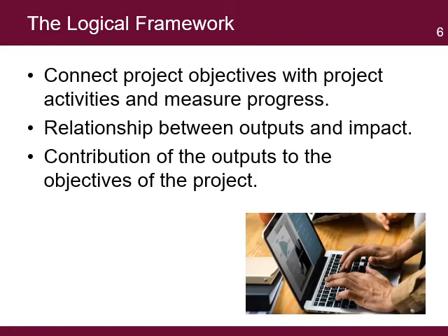A good PMIS is based on the log frame as the framework from which all information will be organized. It is from the log frame that the PMIS can connect project objectives with project activities and measure progress. But most importantly, it records the relationship between outputs and impact in a way that project managers can use to evaluate the contribution of the outputs to the objectives of the project and the final impact goal.